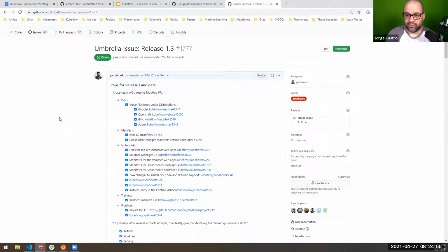And then we'll make a point to remove all the single person dependencies. I think especially if we have a release team this time, instead of one person, we avoid the situation of: I woke up, I got a message from someone in another time zone, I make my change, and now I have to wait 24 hours. I think if we can figure out a way to have a rolling release manager, or if everything is written down so that a release manager can make a decision without it being controversial, because we've set guidelines for ourselves, that might be useful as well. But we could talk all about that.